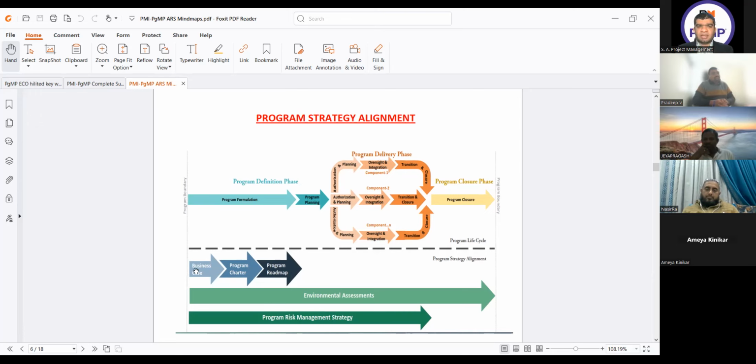The important thing here is that the business case is a document equivalent to justification, in which we have the handover or the linkage between the organizational level things and the program level things. That is my first document, initiating my strategic alignment domain, or directly starting my program. In the program charter, the keyword is authorization, which is authorizing the program manager and the program management team to utilize the resources. It has the scope, key stakeholders, and benefits. We will see the keywords in detail.